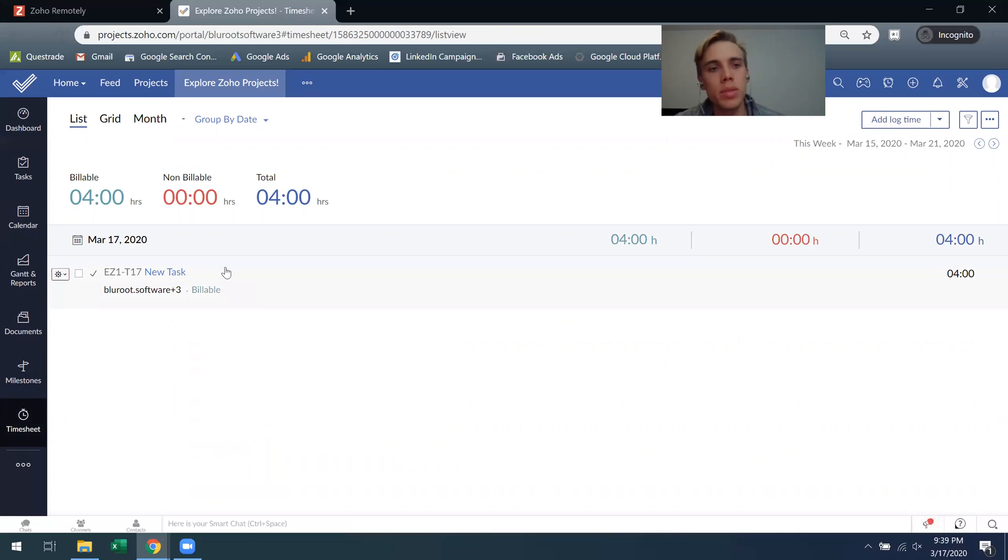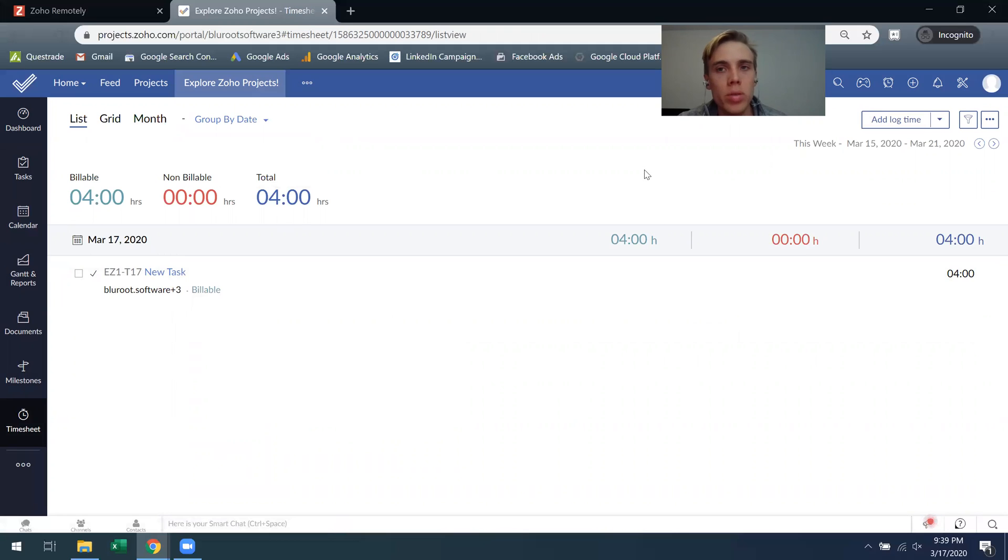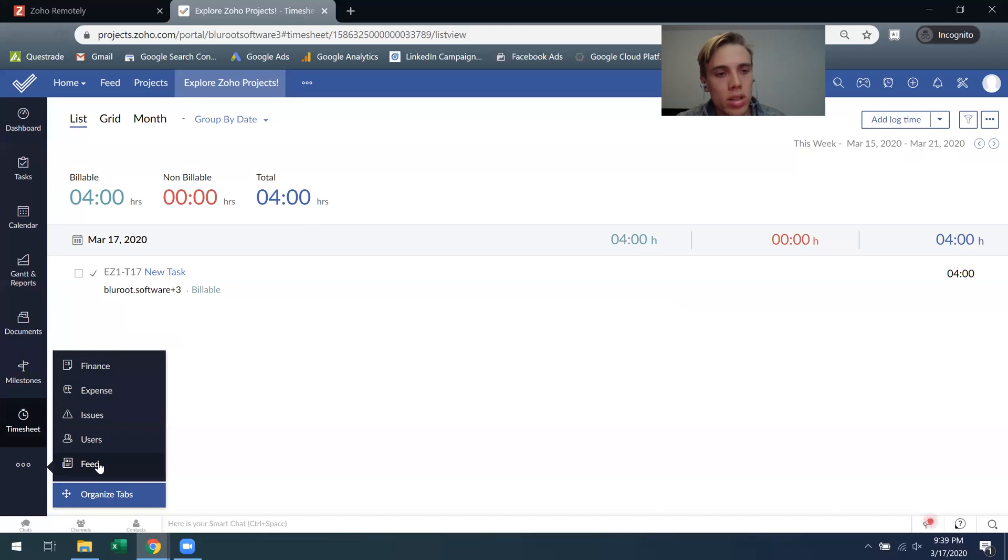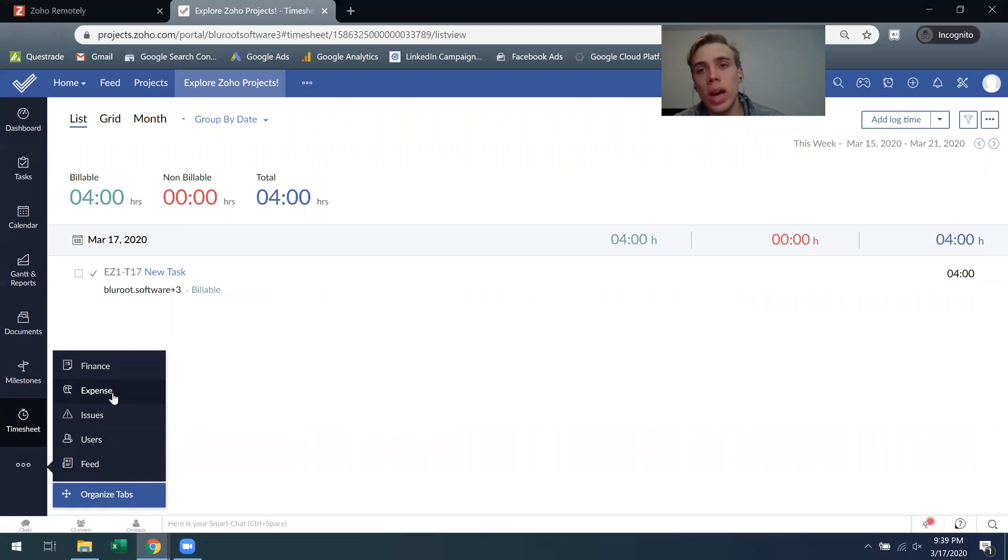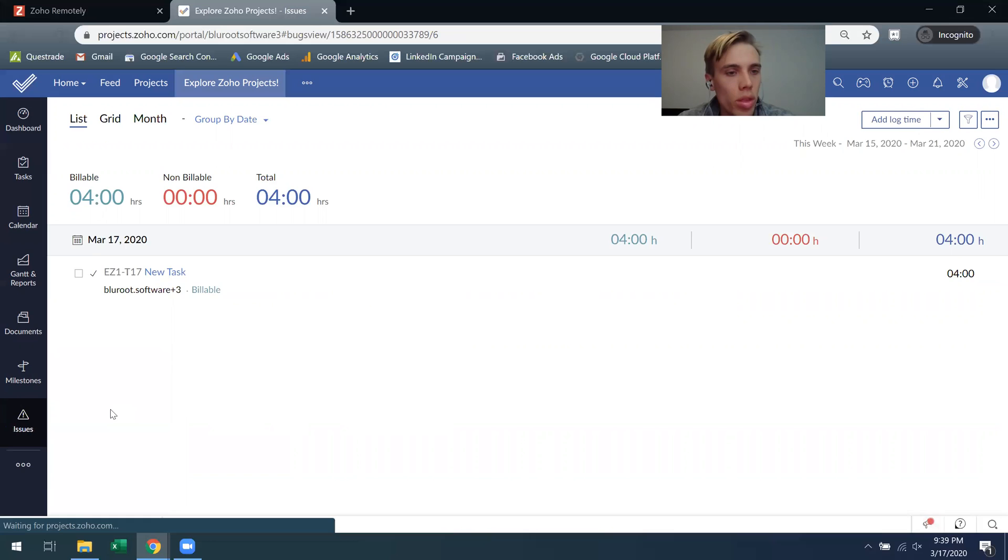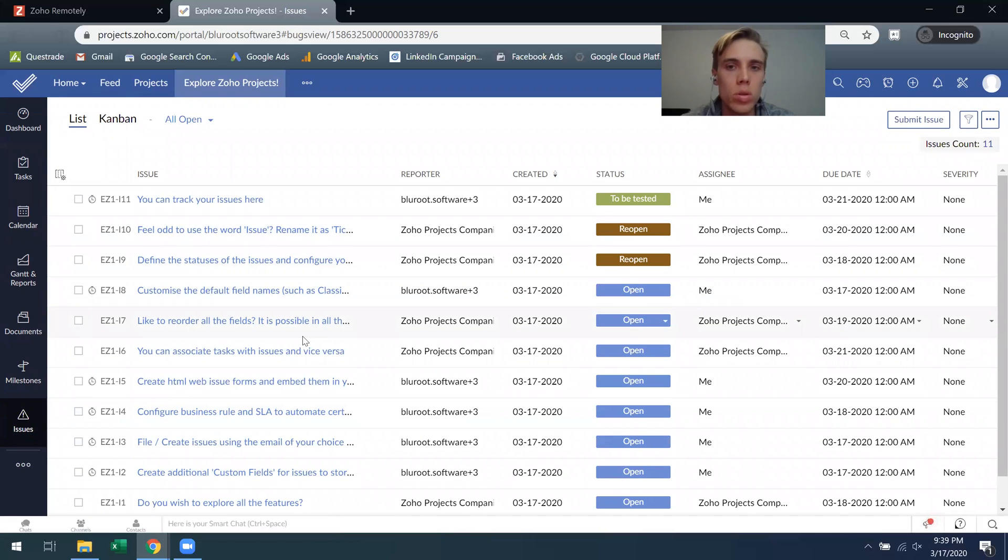Timesheet, I can start seeing how people are billing their time. So I put some time into this new task and now it's rolling up here. I can group it by date, I can group by user, I can see all of that. There's a bunch of other things here, so just adding users, understanding what's going on the project is your feed, adding some expenses. So if you do have expenses you might want to bill back to the client, you can add them here.